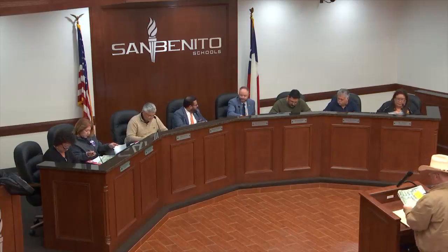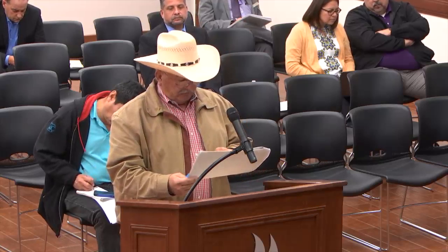Letter B, the next page, you'll notice that all the palm trees are kept in place, and you'll have a parking place in between each palm tree, which only creates about 44 parking places. This would be a lot of work to actually excavate each area, to make just each pad. So it would be pretty expensive, and I estimated about $33,000, and it'd only give us about 44 parking areas. Half of basically what the other is gonna give.